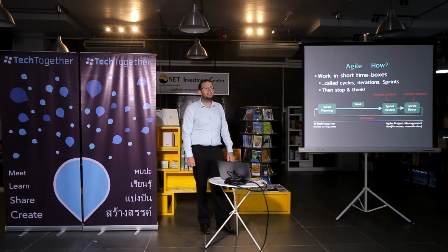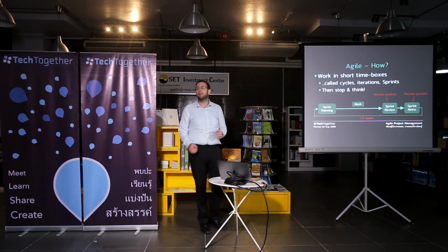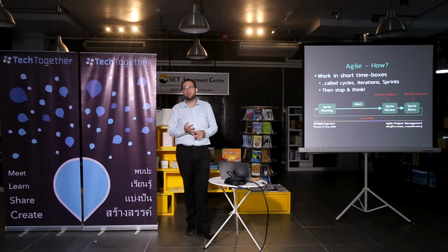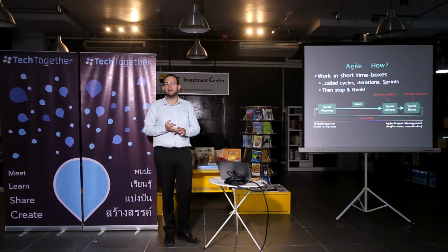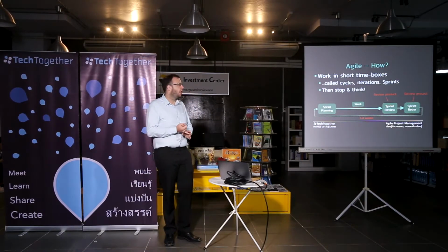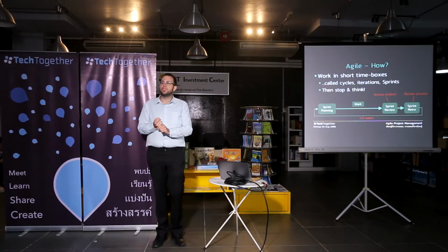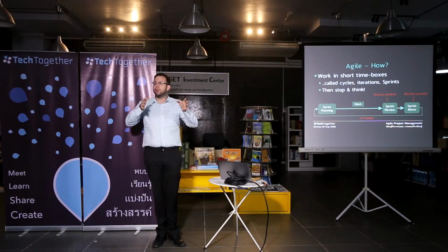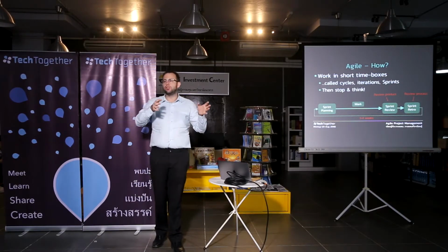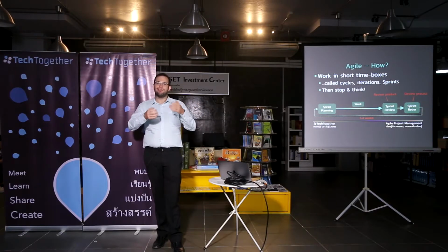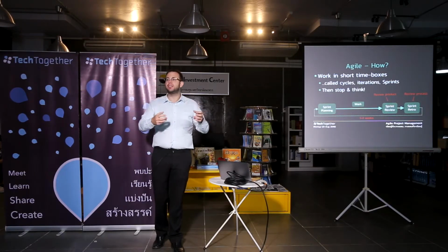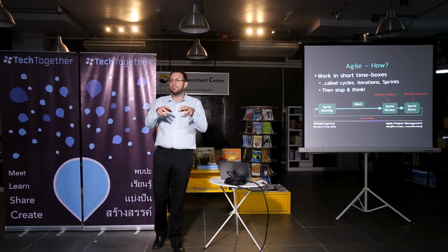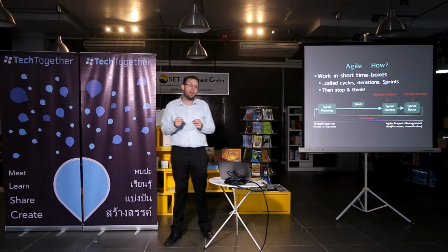The second thing I didn't really cover in the slides, which is that there are 3 main roles in Scrum. There's a product owner, a Scrum Master, and a development team. The product owner is responsible for the direction of your product. So they decide what to do. Literally every sprint they say, this is what is important now. And they might change direction.